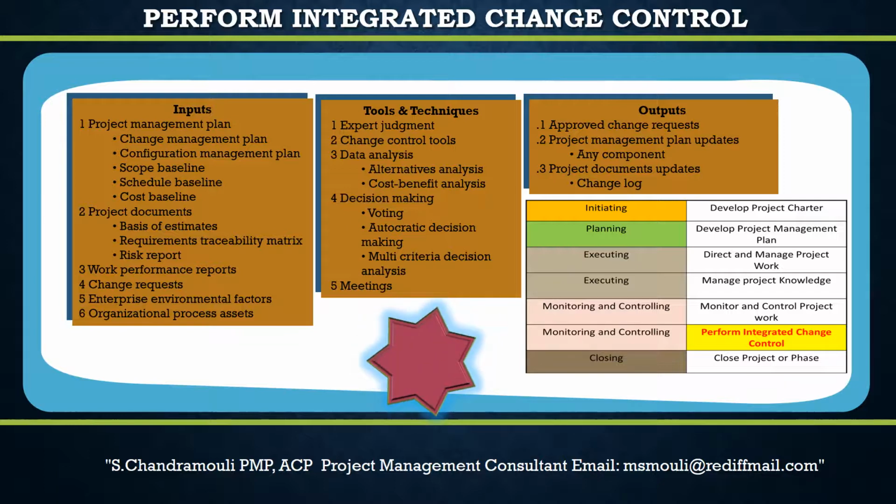In this video, we will discuss the Perform Integrated Change Control process. The change requests raised from different processes are used as an input in the Perform Integrated Change Control process. The change requests are reviewed in this process, and the approved change requests are input to the Direct and Manage Project Work process, which implements the change request.